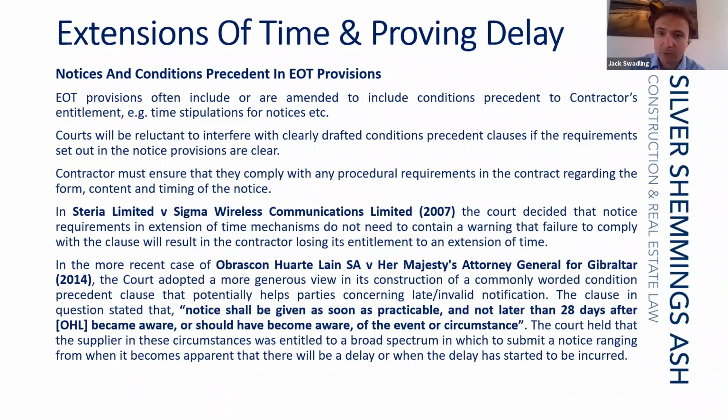Courts have recently shown reluctance to interfere at all with clearly drafted condition precedent clauses if the requirements set out are clear in the contract.